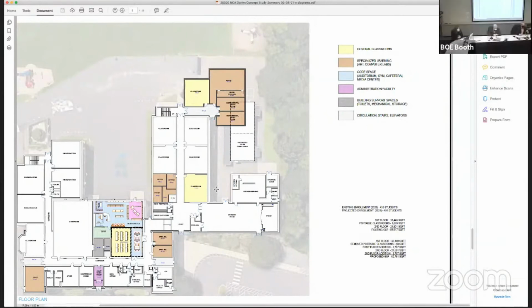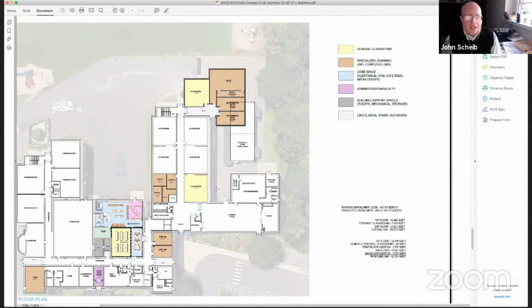Thank you. Sorry, I have one more question. At our previous point, you had mentioned the gymnasium floor spills into the media center. I assume that's still the case and that would have to be renovated in this, because I don't see any renovation on here. Correct. The intent is to do that. Yes, that's factored into the costs. The existing stage floor would be removed. We call it the stage floor, but it was almost like just a proscenium wood floor that runs into the gym. So that would be removed. We would fill and provide a slab on grade, at least for the media center area. We could talk about whether we want to do that in the gym storage area, but for the most part, I would suggest cutting it off at the media center, focusing on that.